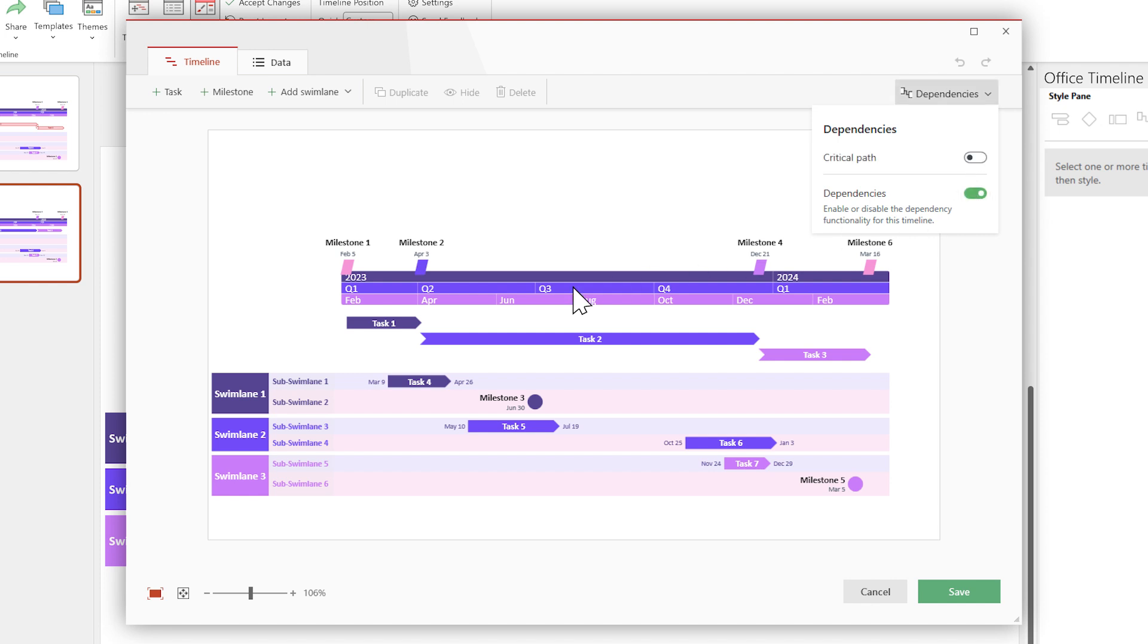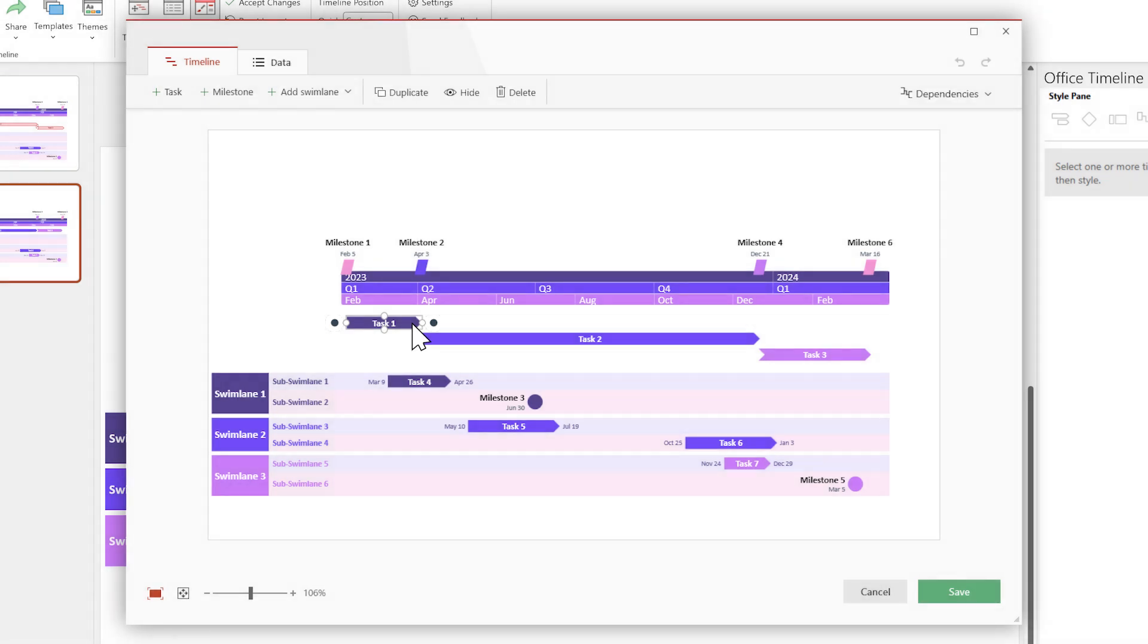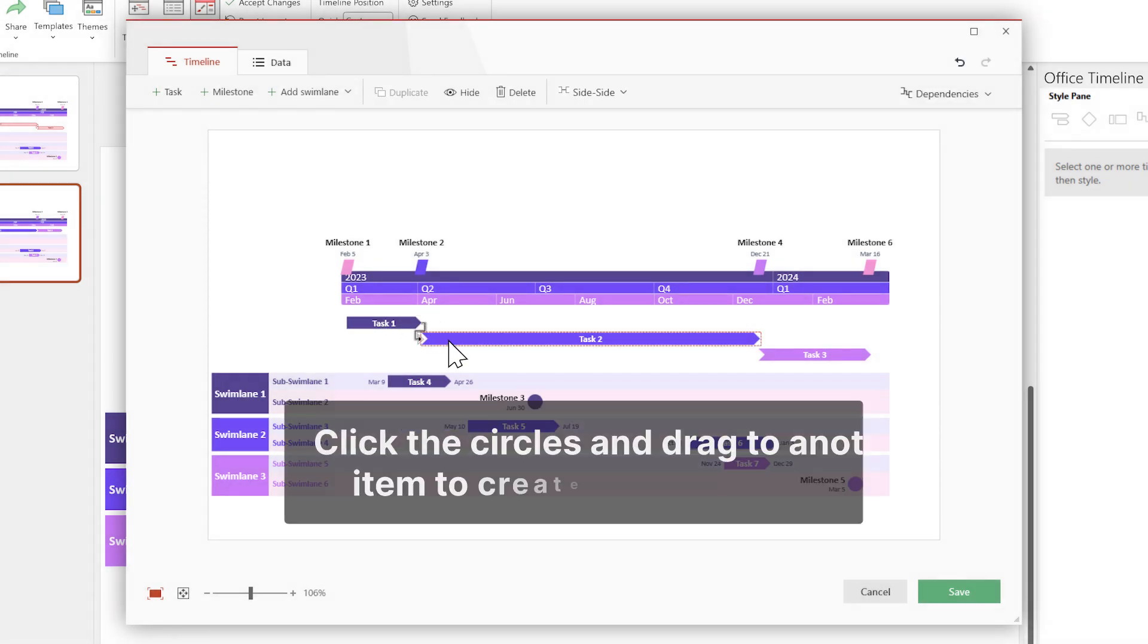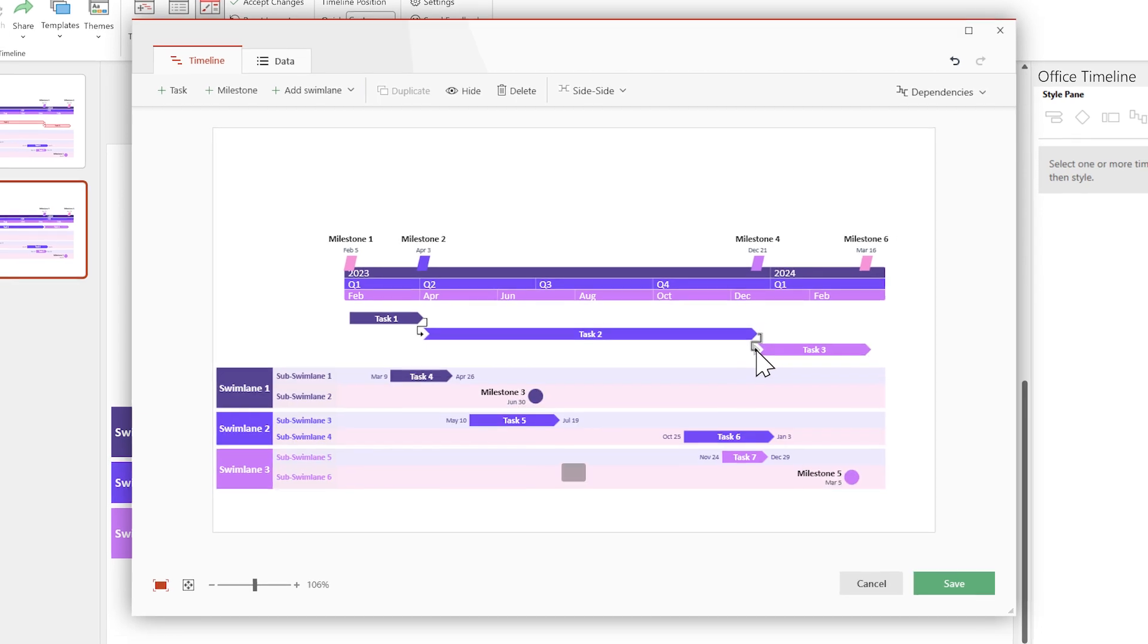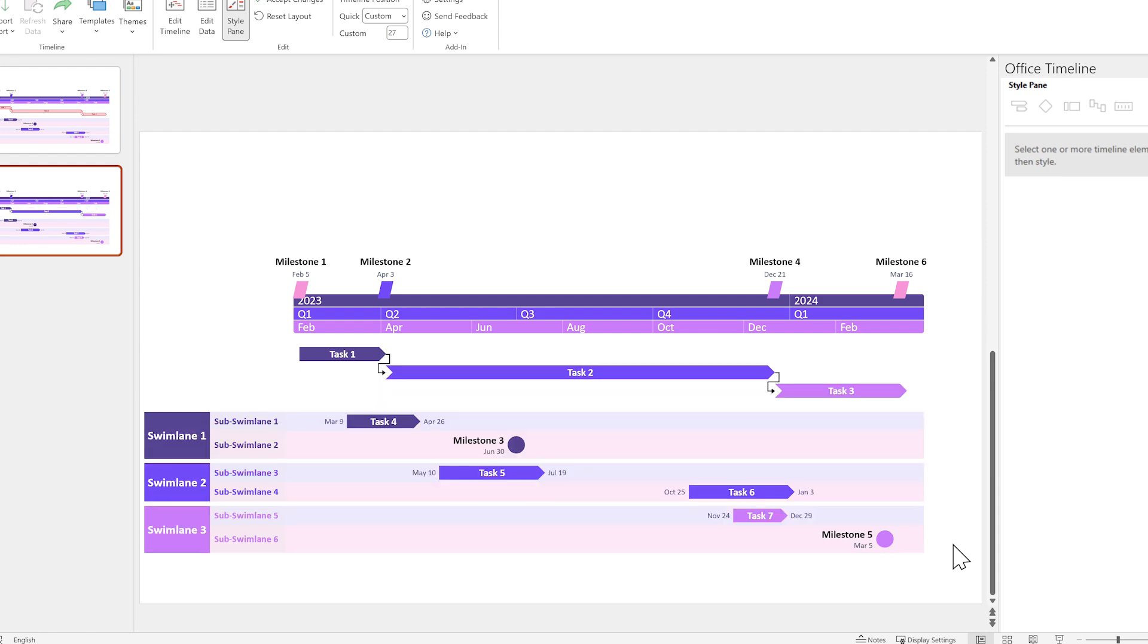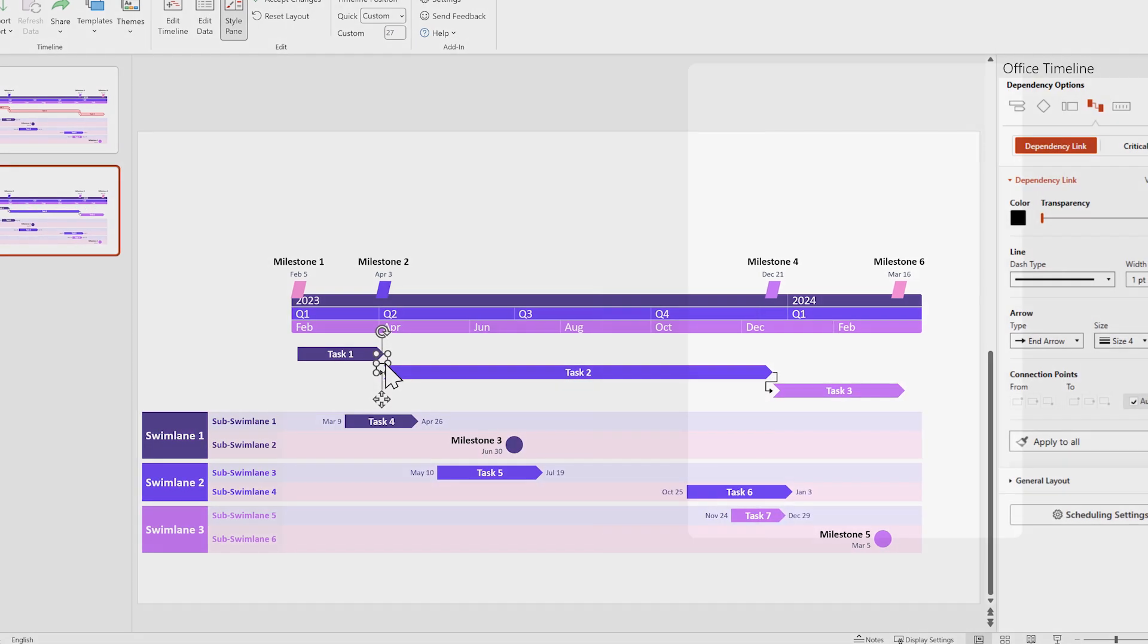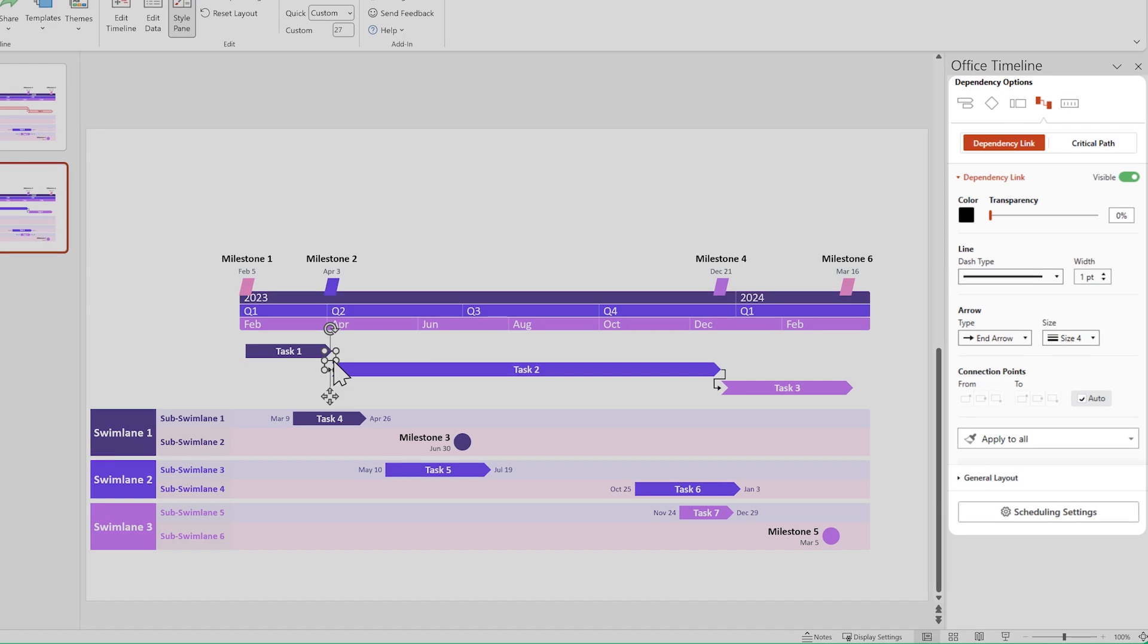Now, if you select a task or milestone, you'll see two dark circles. You can click on any of them and drag to another task or milestone to link them together. Once you're done creating all the connections, click on Save. Now you can customize dependency links using the Style pane, just like any other timeline element. Dependencies are a complex and powerful feature, so make sure to read our support article if you want a detailed look at them.